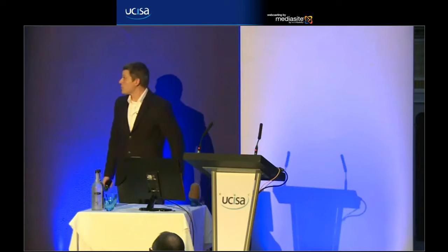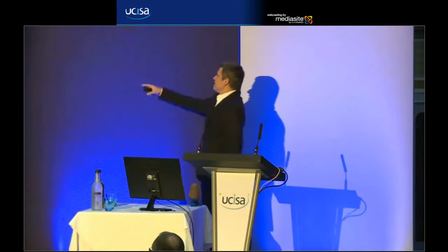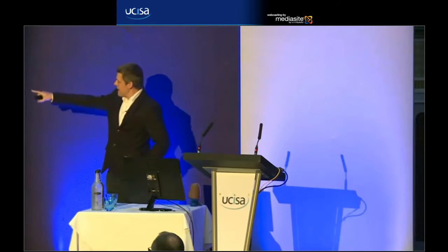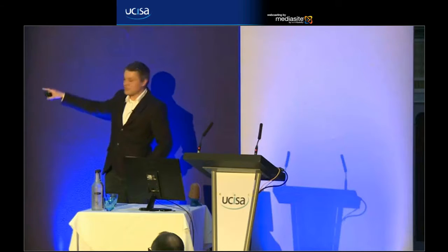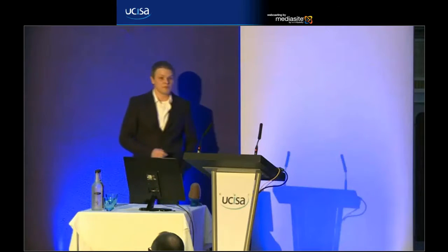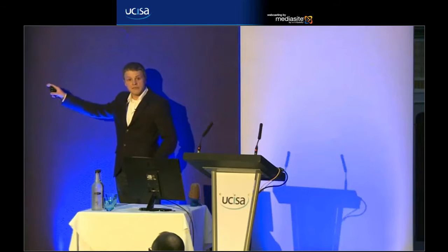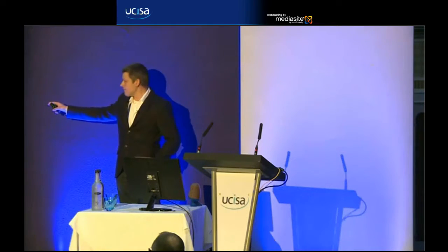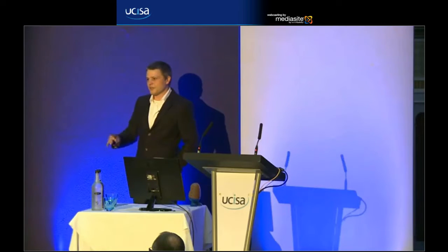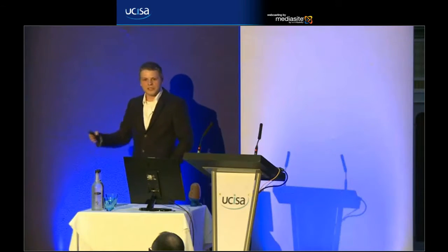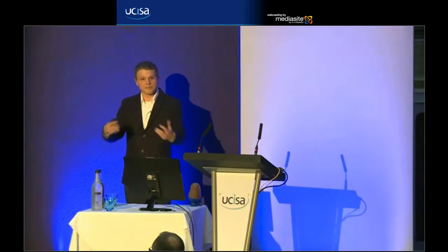This is where you get your poker cards out, and you take your card, and we all put them on the table at once. Gone too far. So you can see there, we've got quite a consistent thing. We've got a few people voting 8. We've got one who's voted 5, which is fairly close to 8 anyway. So we would have a little discussion with this member of the team, saying, do you think that this is a little bit smaller? And they'll have a discussion. Usually they'll come and say, well, yeah, I'll go with 8 as well.